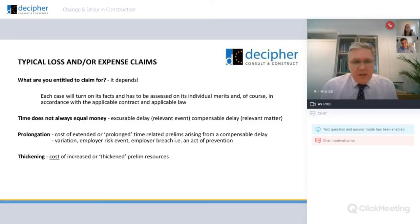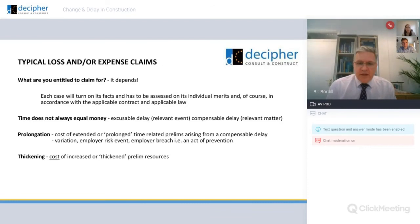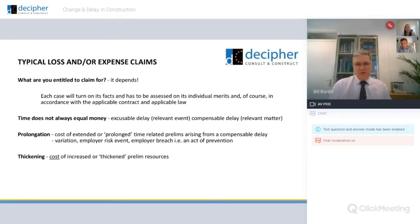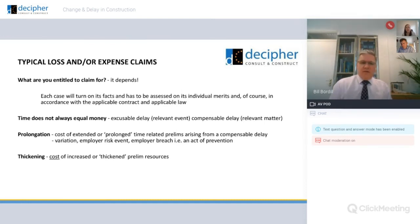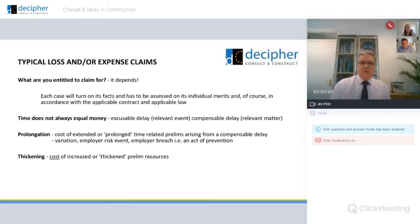What is a typical loss and expense claim for preliminaries? The simple answer is: it depends. Everything hinges on the case, the facts and the actual contract. People say they've got a JCT or NEC contract, but I've never seen a construction project procured on an unamended contract. You quite often find there are as many amendments as clauses in the standard contract — on the NEC I see a lot of Z clauses. That changes how the mechanics of the contract works.